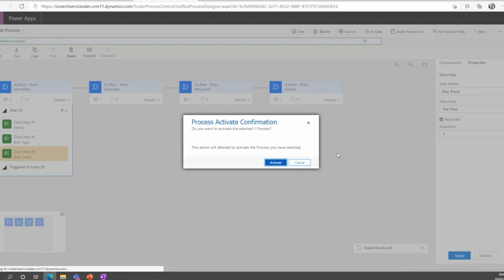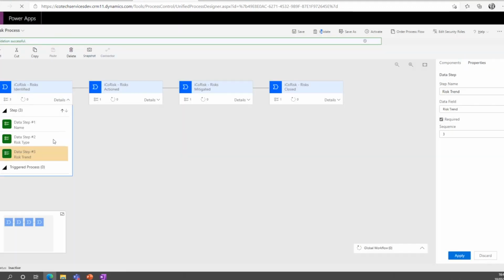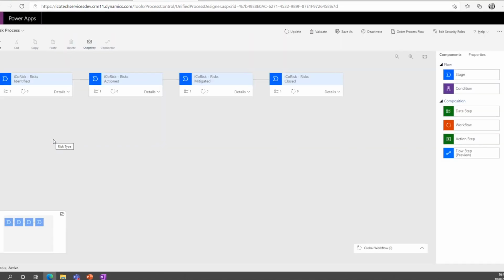Again, just to visualize what this could do for you, you could have a flow that kicks off at this step. So is a yes, no. If you click yes in this box, it could fire a Power Automate flow to go and get an approval from a sponsor or a stakeholder. Once that is approved and that field gets changed to yes, it will automatically go to the next stage in the process. So we'll show you that probably in workshop 4, 5, or 6, somewhere in there.